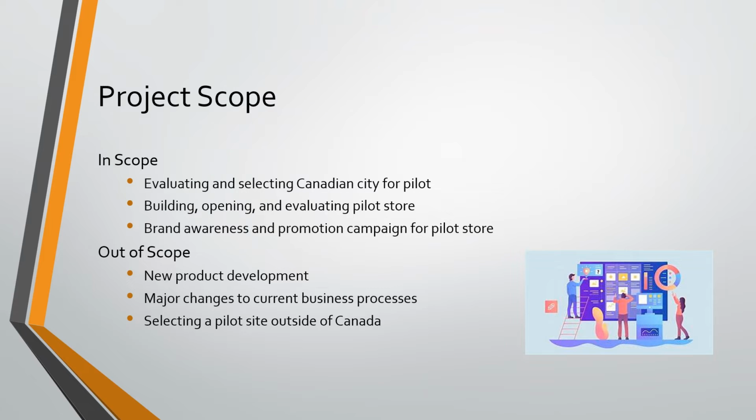Project scope and project exclusions. Included in scope and out of scope. In scope involves evaluating and selecting a Canadian city for the pilot, building, opening and evaluating the pilot store, and a brand awareness and promotion campaign for the pilot store. Out of scope are new product development, major changes to current business processes, and selecting a pilot site outside of Canada.